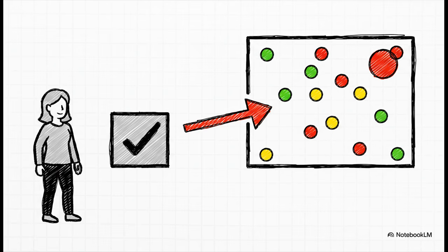When you finish your work, you don't need to wait for a manager to tell you what to do next. You just look at the board and you pull your next task from the project that's the reddest, the one in the most trouble, that you have the skills to help. It creates this amazing self-organizing system where everyone is always focused on the system's biggest priority.